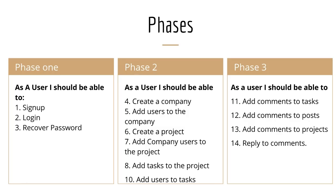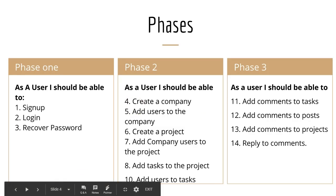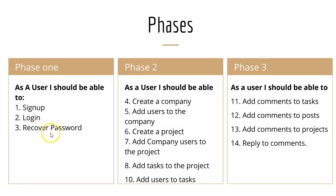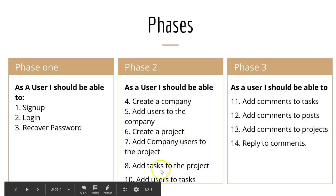I've tried to divide this into three phases using user stories, but this is by no means exhaustive — these are just the key highlights, and as we develop it we'll add and remove some. Phase one is when we complete sign-up, login, and recover password, involving user and admin roles. Phase two is where we give the user the ability to create a company, add users to the company, create a project, add company users and tasks to the project, and add users to tasks. Phase three will be basically about comments, making sure that everything can take comments.